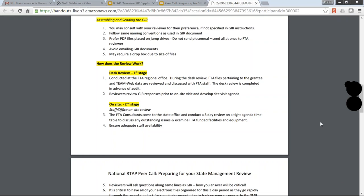So that will take a lot of time and planning. So it's really almost considered as a project and you have to do project planning in order to have a successful SMR and triennial. You're going to have to have weekly or even more frequent than that meetings where you're going to bring your team in to assist in preparation. So you will have about nine months to a year prior to that review. You'll be notified of your SMR review team, which are a consulting team of your regional office or the USDOT. And the final agenda for the site visit will be sent about one to two weeks before the actual review. Any questions about the preparation or the GIR packet before I move on?